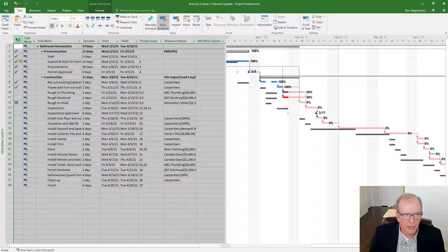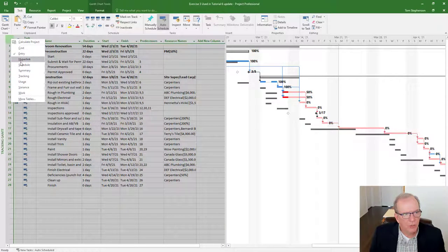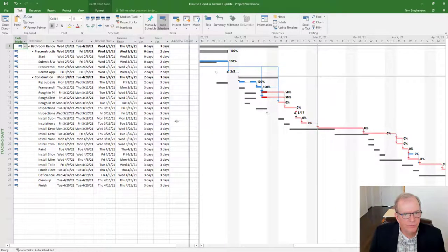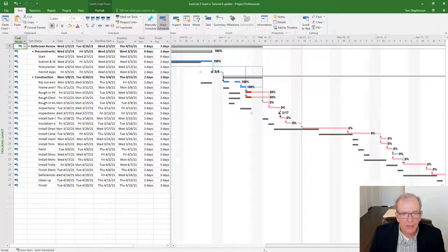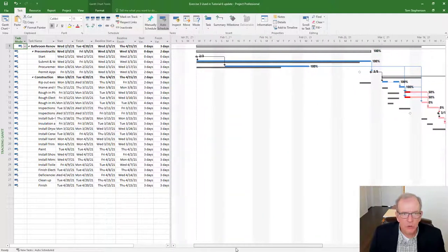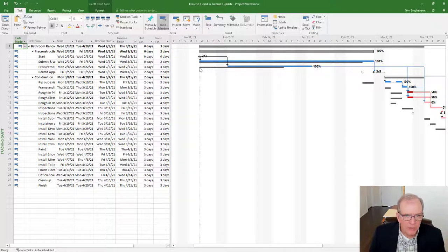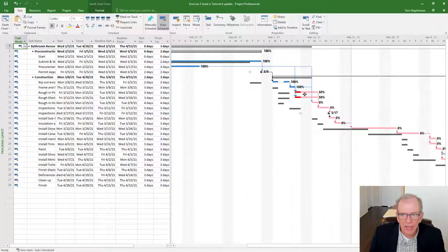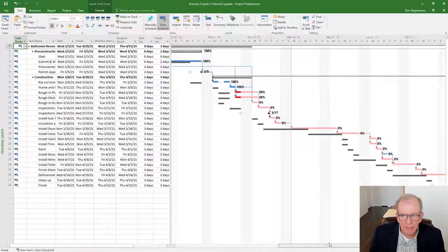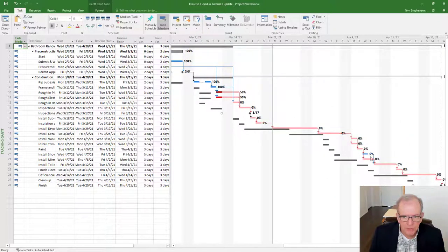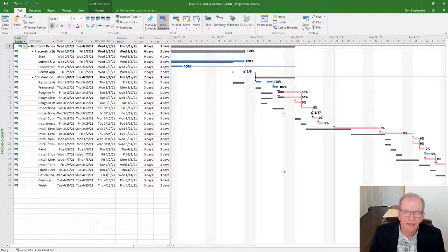That's the nice thing about the indicator column that I've been telling you in previous videos. It tells me if there's stuff going on. I'm going to click on the square icon. I'm going to go to my variance screen. So now in this screen, I can see the variance and the tracking Gantt. So the tracking Gantt has 2 bars. The bottom bar represents the plan. The top bar represents either the actuals, like here, because it's darker blue, or things that are yet to happen. All right, so this is critical path items, things that are yet to happen. In the blue, that's got float, lighter blue though. So anything past the status date, and the status date is here. One of the unfortunate things is I have to put the status line again if I want to see it.